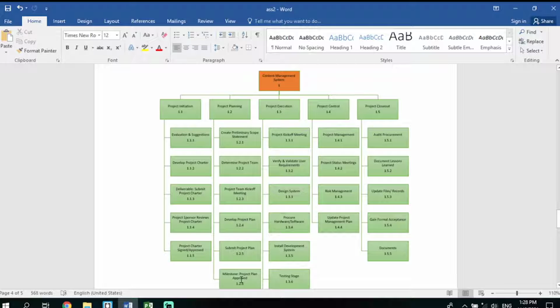A milestone is a task or activity in project management with 0 days. It doesn't have a duration. They come in as instant activities that have to be done immediately and don't need a long time. For example, after doing the project plan, you take it to the top managers to get approved, to see if it's the right thing done.